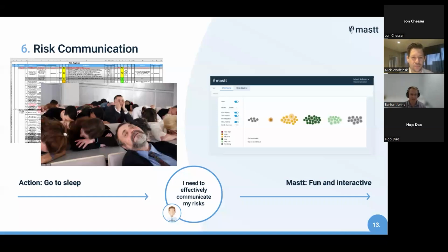But Mastt have developed a snapshot risk profile for the project, which can be downloaded likewise. And that shows simple pie charts identifying the number of risks that are open to closed, or the number of high risks, very high risks, medium, low risks that you've got on the project, and how they're split, in terms of the ratio over the whole project risk profile. So really, really easy for the reader of the monthly reports to be able to hone into those risks that matter.